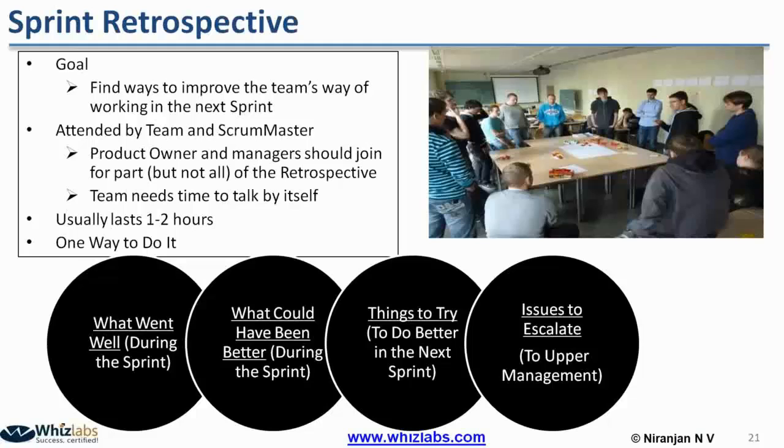So like this, the sprint retrospective has to be done. This is one of the ways, not the only one. There could be several ways. The team can also think of doing a SWOT analysis. S means strengths: the team can identify what their strengths are, and then weaknesses, the things that did not go well. And opportunities, and what the threats are. If they don't do this, this will be a threat. So like this, the team can also use a SWOT methodology.